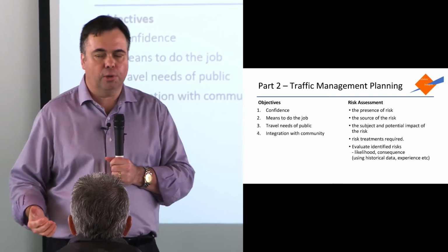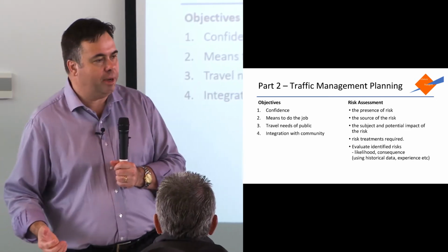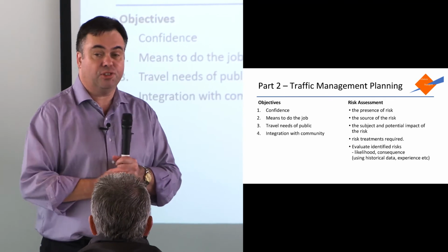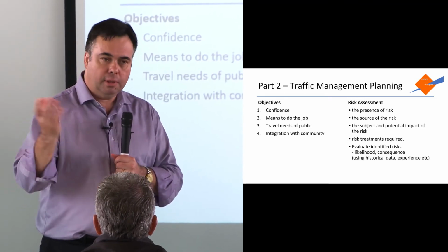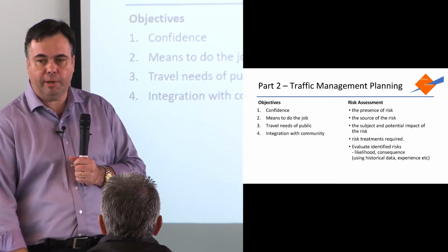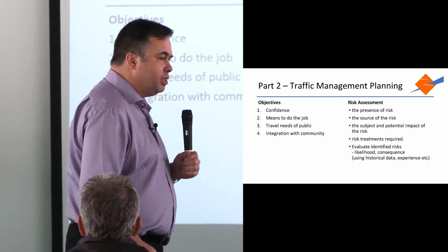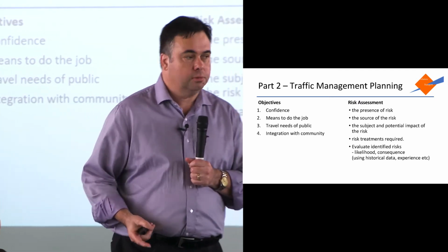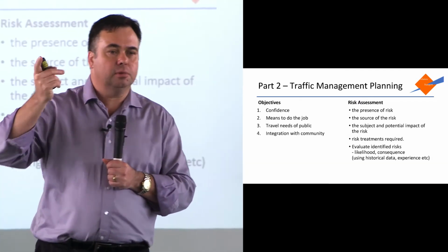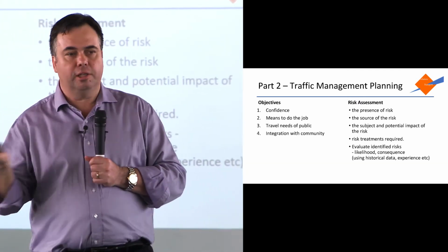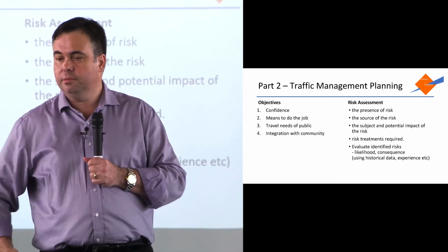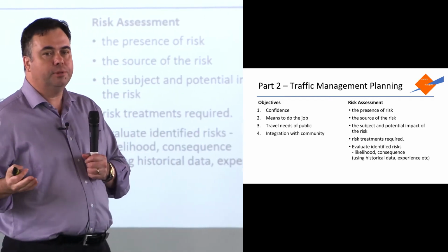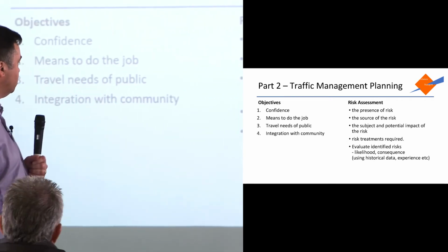Commercial properties, don't just look at opening hours, because I don't know about you, but most shops get their deliveries outside of retail hours. If they want repairs or maintenance done, it has to be done outside of hours. So you need to think about all of those properties. Where are the local parks? Where are the local schools? This hockey centre, Ben, I think you said it, well, Ben's gone now, but Thursday night is when all the matches happen. So don't do something around here on a Thursday night. Find out all of those types of issues that you need to be aware of.